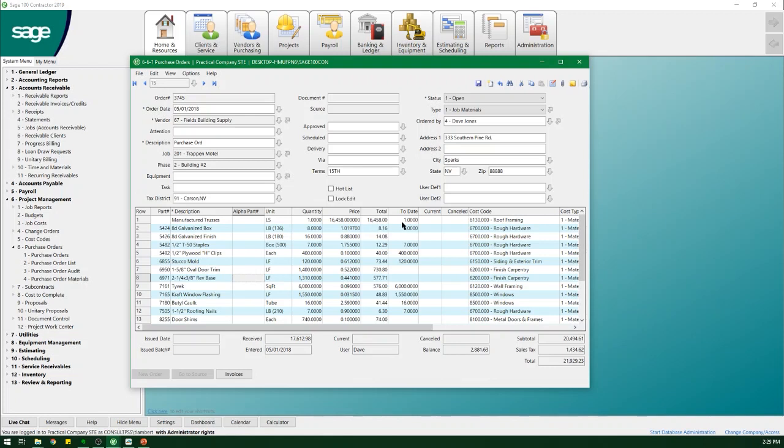It also keeps up with what's going on with the PO. What have I received to date? So I can figure out what I've got on back order. There are some auto close pieces in here. You can also limit access to AP through a purchase order. I can set a vendor and say I'm not allowed to receive an invoice unless there's a PO that goes with it. A lot of ways you can control your cost.